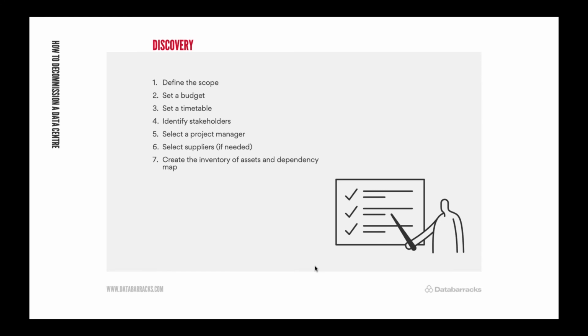Particularly on creating your inventory and your dependency map, this is something we do a lot of when we're setting up disaster recovery for a company, because obviously we need to know what those dependencies of servers are when we're recovering and bringing them all back. Hopefully, when you're kicking off this project, you're not starting from a standing start. You will have some detail on this already. If you're ITIL, you're going to have a service catalog, for instance. Hopefully, you have a configuration management database.